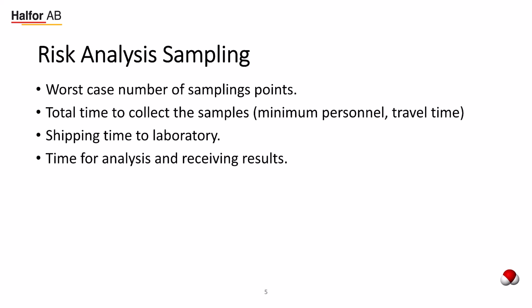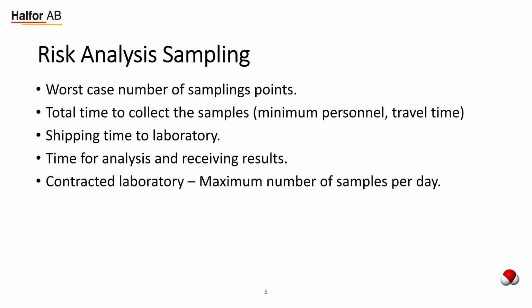Also, connected to this, what is the time for analysis and receiving the results? In this particular case, the lab used was overloaded, so other labs had to be called in to solve the analysis challenge. Also, the contracted laboratory, what is the maximum number of samples per day? As I said before, in this case the lab was overloaded. You need to know what is the limit for the lab you're using based on how many worst case number of samples you will send the lab.